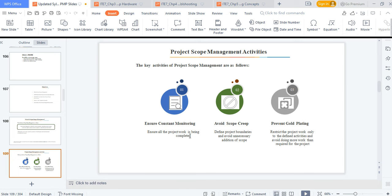The app has been deployed, and now the client says he needs changes because some things were not followed. We've told him to please create a correction or change request document based on the initial scope. We want to avoid scope creep — we want to make sure that any amendments to the app on the Play Store are not introducing new work. You don't want addition of scope; you don't want to go beyond the boundary.